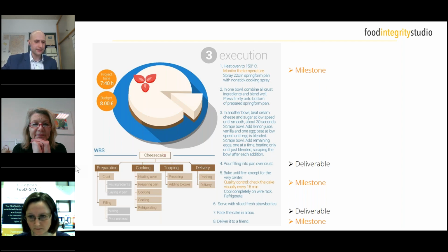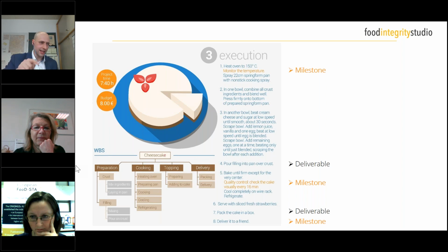To my understanding, there is no tool to help you identify milestones. You just see it in the planning. So if you use the normal planning tools and then you identify certain steps where you see several activities, especially time critical ones, coming together, then that's where you usually put a milestone. Usually it depends on the experience of a project manager to identify why you have to set a milestone. I personally don't know any tool that helps you really say this has to be a milestone. If there are any, I simply don't know. It might be that there are any. I personally don't know any of those tools.